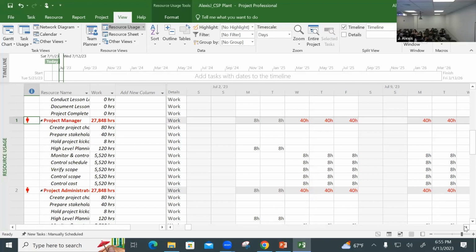You could say the project manager works on a salary. There's no need to track his or her time. We're going to make it a cost resource. Or you can say, well, I'm going to try to see if I can spread the project. If you really want to track his or her time, spread the time over the project.